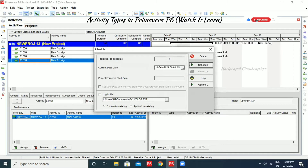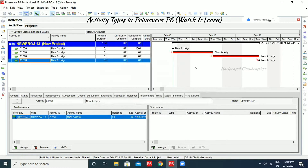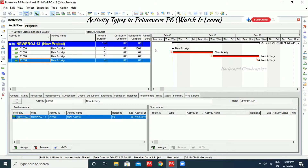So we can start with the 10th of February at 8 AM and go for schedule. Now we have got our project scheduled. The total duration becomes 10 days. Before, it might have been only 5 days. It will take the longest duration first, and based on the critical path we will get the original duration.